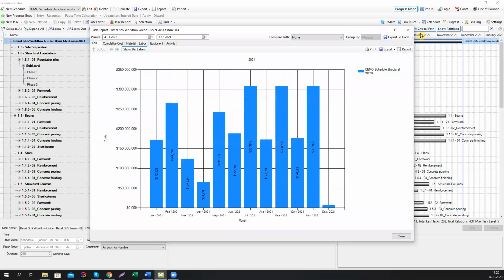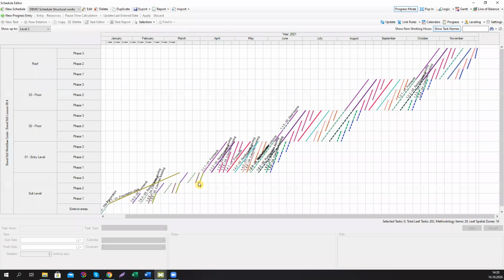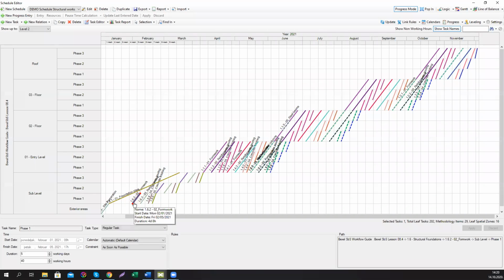Okay, the situation with this task is a little bit better, but now we have made a problem with our following activity, that is pile caps formwork creation, that is now completely broken, that you have a lot of idle time for your construction crew, because duration of this task is much lower than the one of the predecessor task,